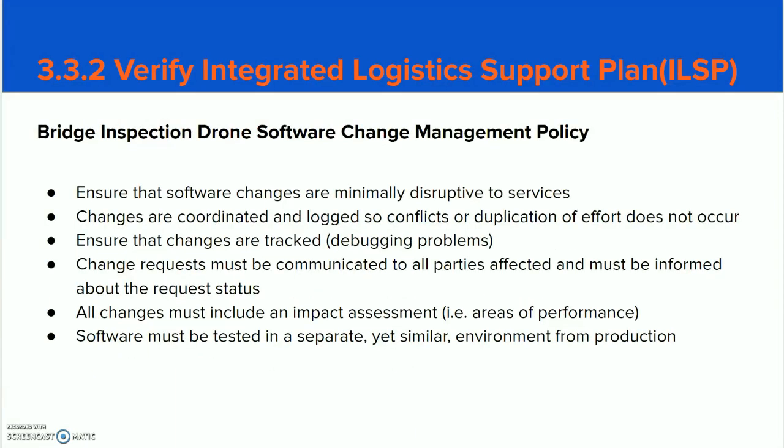Our change management policy will ensure that software changes are minimally disruptive to services, that changes are coordinated and logged so conflicts or duplications of efforts do not occur, and that the changes are tracked. Change requests must be communicated to all parties affected, all changes must include an impact assessment, and the software must be tested in a separate yet similar environment to production.